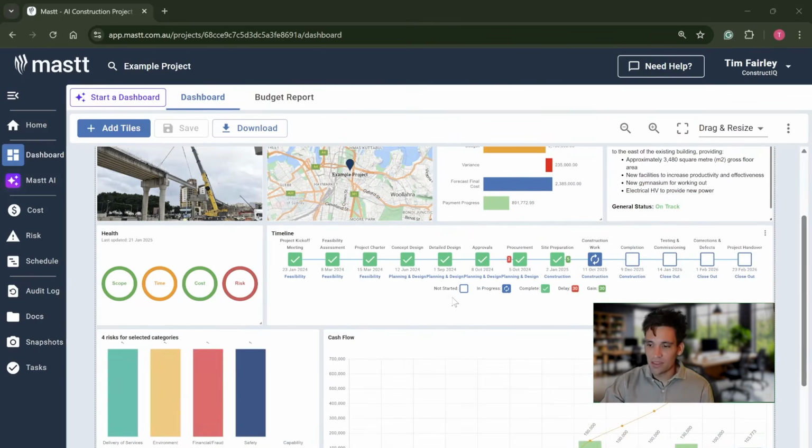The next thing we can show is some sort of overall timeline. So if we have space, we could do that as a Gantt chart, or here you can see we've done it as a worm chart where we've just got each of the individual project milestones, whether it's complete, whether it's ongoing. Again, this works for a simple project where it has a linear set of tasks, but if there's complex interdependencies, someone's going to miss it.